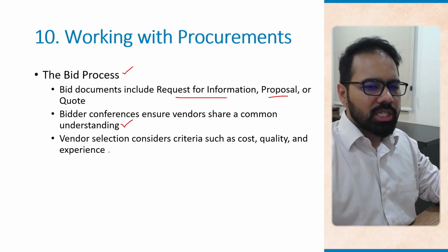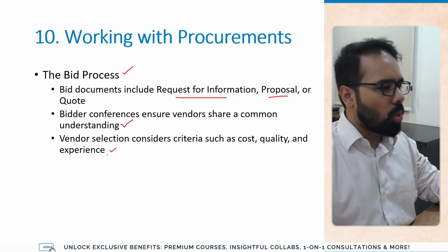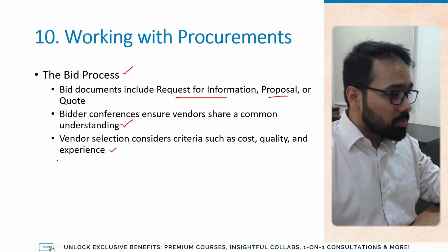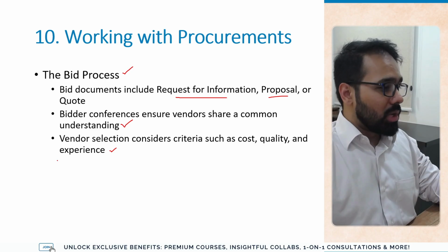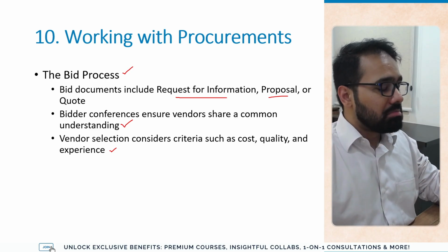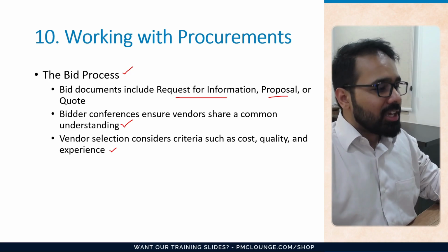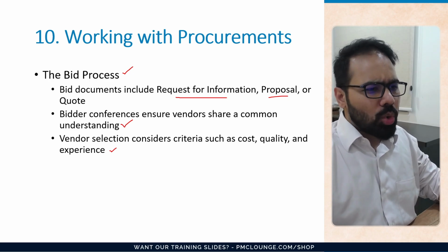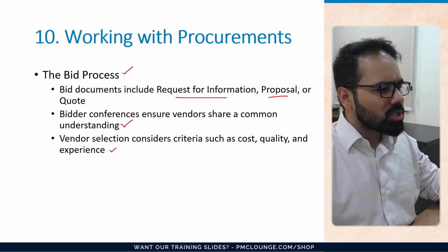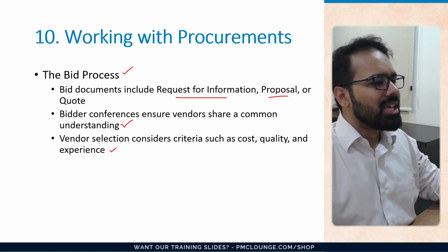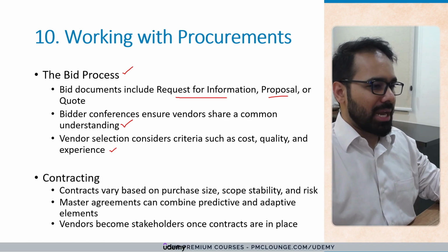Vendor selection considers criteria such as cost, quality, and even experience of the vendors. For our e-commerce project, the vendor with, let's say, a strong security experience may outweigh the lowest price quoting vendor, right? Your focus would be on strong security rather than lowest price in this case.